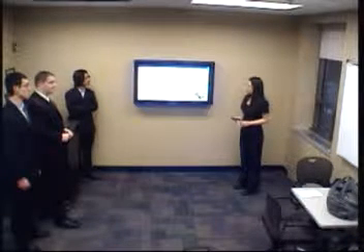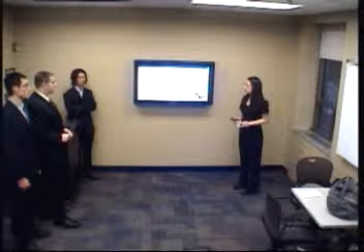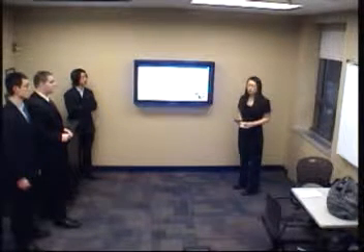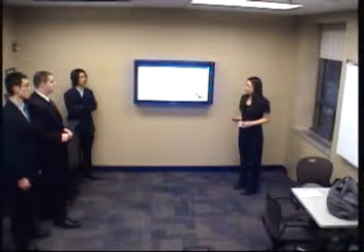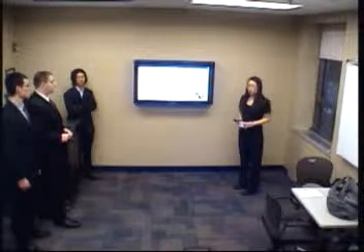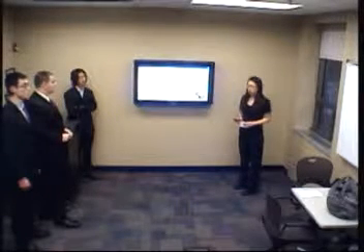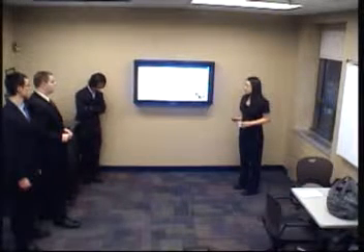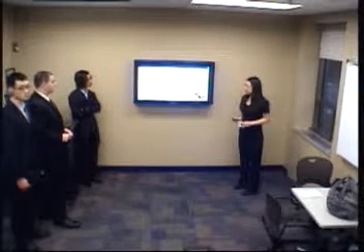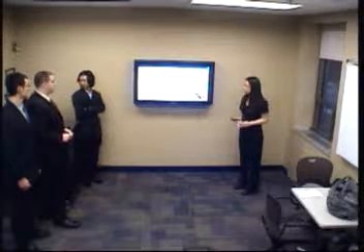The third one is the technical skills of our consulting team. Since we are the employees, we need to customize the software and write some code. When we design the software and implement it, there might be some technical issues we cannot handle. That means we either take extra time to do it or hire experts to do this for us, which means more time and more cost. So we need to consider it before we make the actual plan for this.